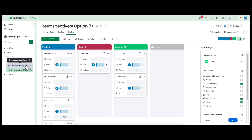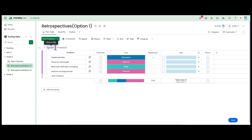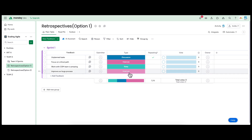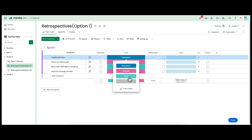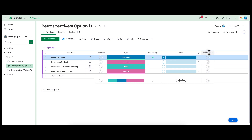Now let's take a look at the additional retrospective board I mentioned at the beginning of this video, and how you can get the free template in Monday.com. For this solution, your feedback gets captured per sprint in a group. The team inserts their feedback as items on this board, and after a group discussion, the team picks an action from a list of statuses. You can modify this list and adjust it to your own preference. After the discussion, the team can vote on each item to decide the priority. Usually, a team member will take the lead on driving each new improvement.